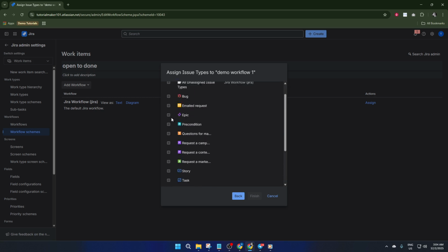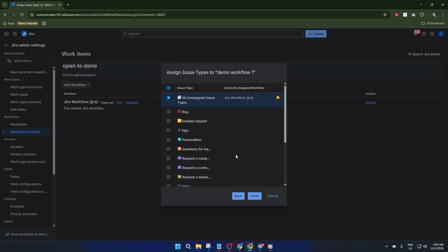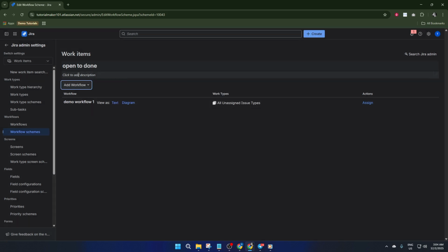Now select Edit Workflow, where you can add or adjust statuses, add new transitions, and set up conditions or validators. These let you control exactly who can move issues along the process and when. That's how teams make sure only the right people or steps are involved at the right time. After you finish your changes, hit Publish Draft. This is the moment your updates will go live, so take a breath, review your work, and then publish when you're sure everything's set up how you need.